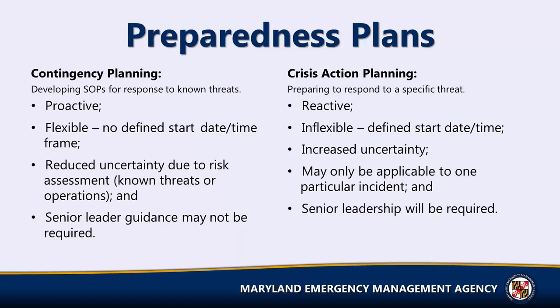On the other hand, crisis action plans are developed for threats or hazards likely to impact the community at a defined time. The best example of a crisis action plan is a special event plan that is developed for a very specific period of time and meant to address that specific issue. Crisis action planning often features an environment with shorter time frames and less information, since these types of plans tend to be developed quickly in anticipation of an incident.